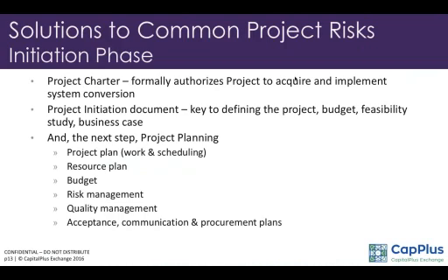Identifying criteria for acceptance of the project work. Often we see there are issues when the final sign-off comes with the vendor. This is being postponed. I've never seen anyone signing off acceptance of work during the project period that has been defined. It's always delayed. The reason is these are not being defined in detail.